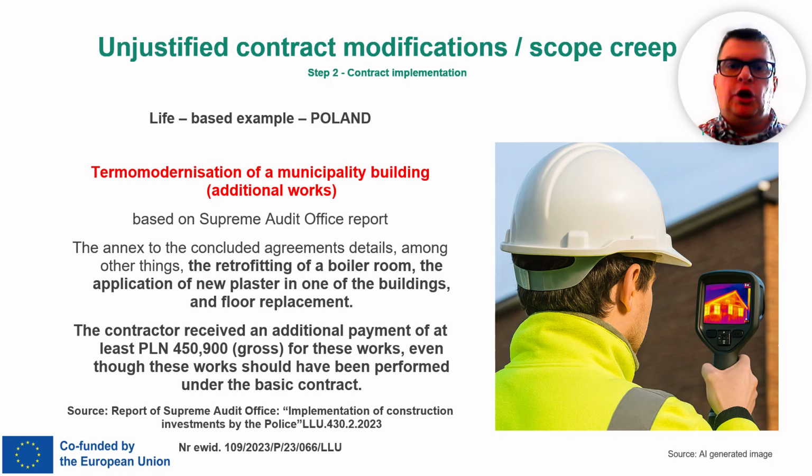These included things like retrofitting the boiler room, putting new plaster on one of the buildings, and also replacing the floors. The contractor was paid at least over 450,000 Polish zloty for these additional works, even though in reality they should have already been covered under the basic contract.